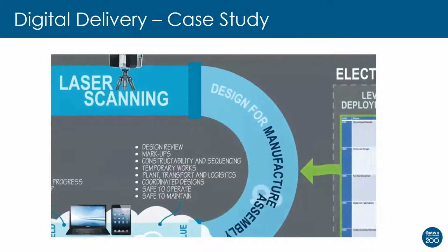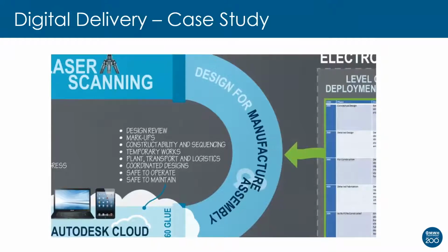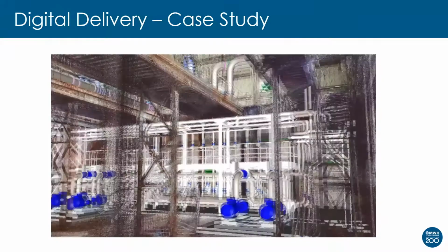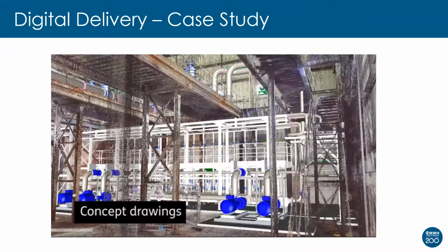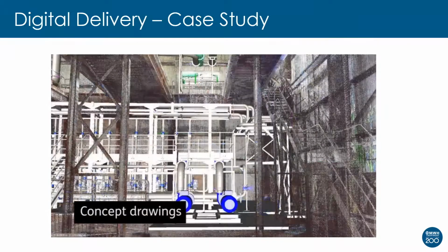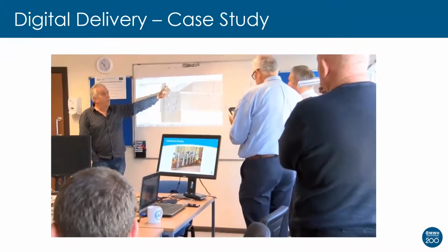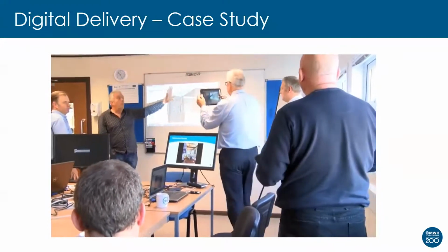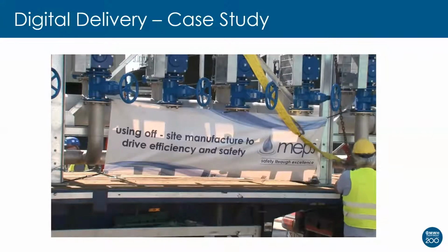Frankly, we had a 70% off-site challenge. This started right back last year when we were in the conceptual phase of the project. Before our designers really got into the detail of the design, we held workshops and set out our off-site strategy. And we really formulated the ethos that it will be done off-site unless there's a very good reason not to do it.